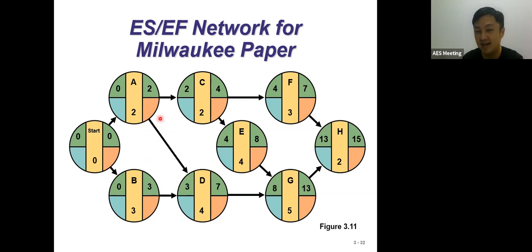Okay, so we try to understand. If you select 3 here, to say that activity D can only start at 3 weeks, is that true? We think carefully. In activity A, in how many weeks can you finish the activity? 2 weeks here. Yes, very good, a very short time. But do remember, activity B requires 3 weeks. So between 2 or 3 weeks, we have to think carefully.